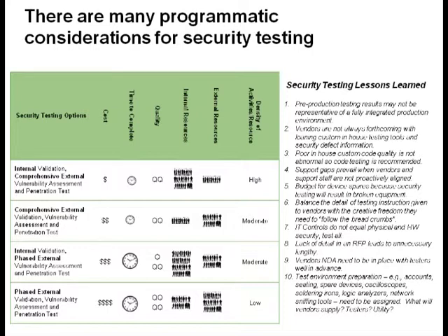I didn't go through every one, but I wanted to hit on some that I thought were really important. If you're going to do pen testing of smart grid devices, it's really good to budget for spare units. A lot of people didn't think of that, but when you're doing extensive security testing, you don't want that device to go back out into the field ever. More than likely, the device probably is not going to work very well when you're finished. So budget for spares. If you're consulting from a security standpoint and you know this testing is going to be done, ask your project managers, hey, can we order another one, because we don't want to have to wait 8 weeks for another device to come in.